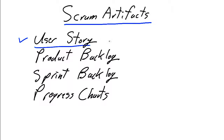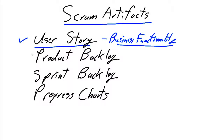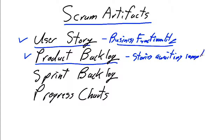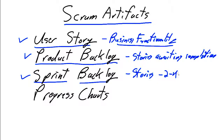The key artifact is the user story, which identifies the business functionality to be delivered by the project. The user stories are combined into what we call the product backlog, which are the stories awaiting completion. As we move forward in the Scrum process, stories are removed from the product backlog and moved into a very specific sprint backlog, which identifies the stories to be completed in the next sprint — a defined two to four week development cycle.